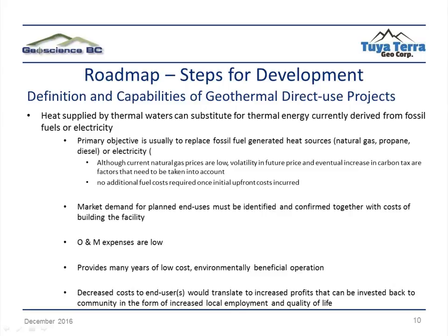The market demand for plant end uses really needs to be identified at the beginning stages of project initiation, and we'll go through that in a bit more detail later on. But if you've got a resource and you don't necessarily have the market demand, that would be something that would have to be created and would incur additional costs. And so a project may not necessarily be economic unless there was interest in bringing entrepreneurship to the area or tourism to the area and adding more of a market demand than would be otherwise there.